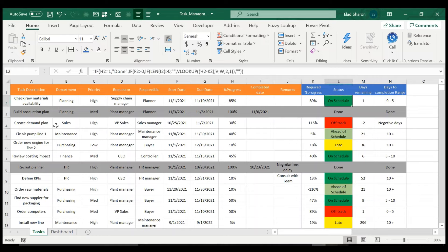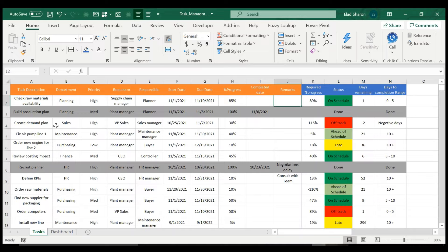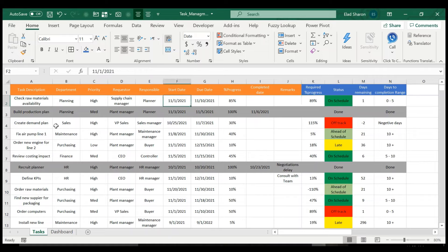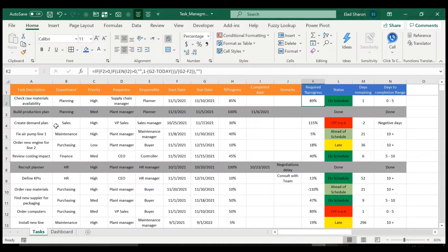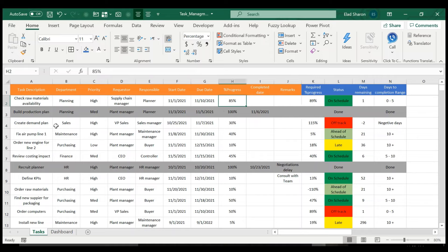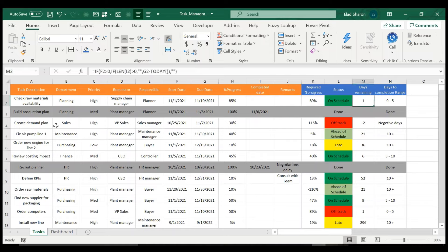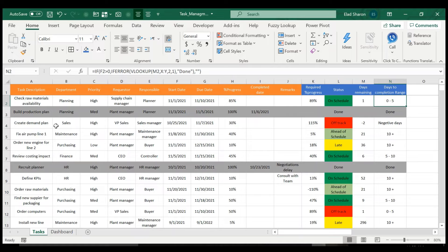Over here, there are four columns that are supposed to show you where you are versus where you want it to be. So for example, required progress shows you that this project started on the first day of November. It should have been completed by the 10th. So by today, which is the 9th, should have been at 89%. You're at 85%. So it's on schedule with one day remaining.